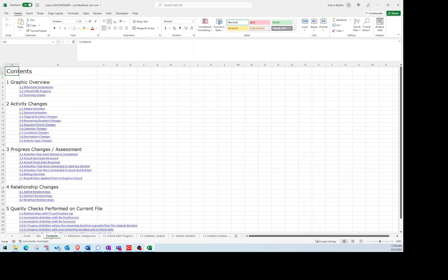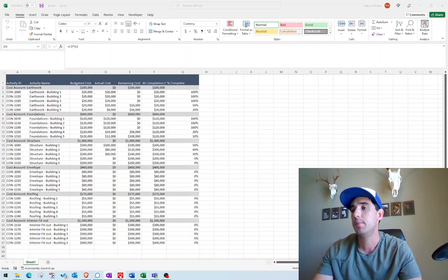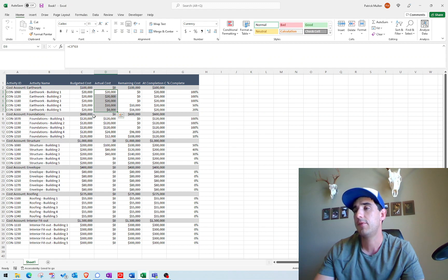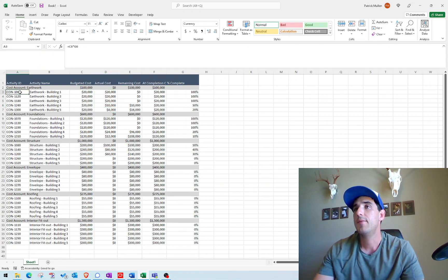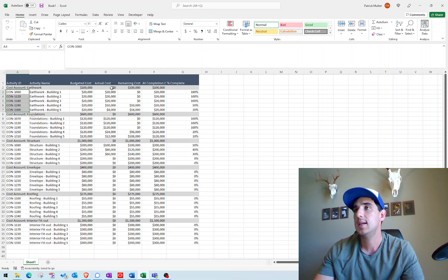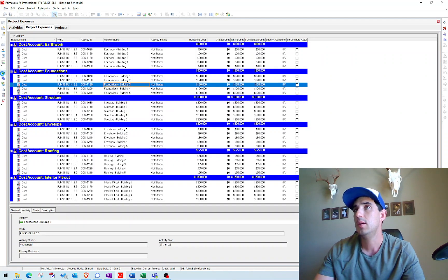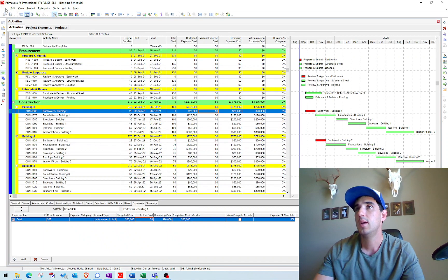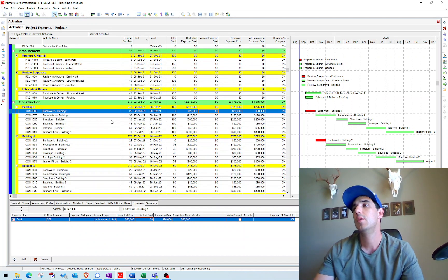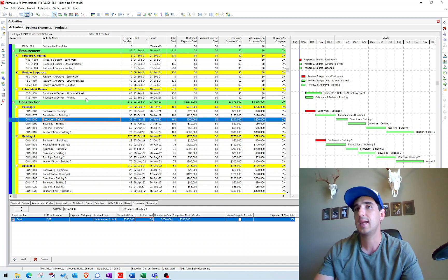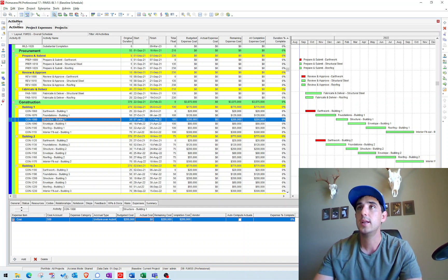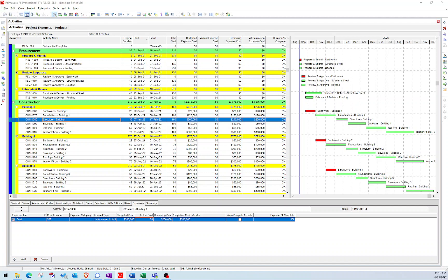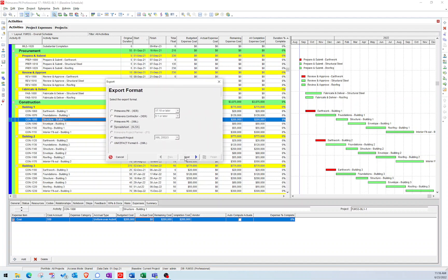So let's go ahead and jump back in. We have our Excel file here with our activity IDs and the actual costs that we want applied to each one of those activity IDs. The first step that we need to do is create an export in Excel from this file so we have a template to bring in those values back into the schedule. So let's do a file export, and we're going to make an Excel file here using expenses.